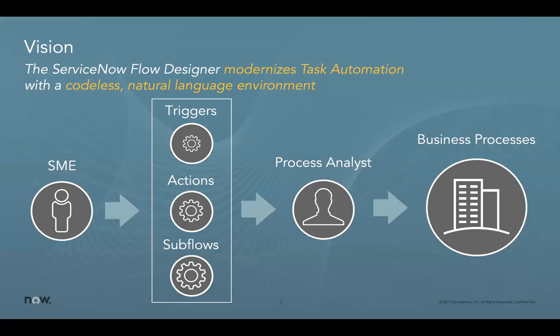So Flow Designer has taken that to the next level, and we've really exposed almost all of ServiceNow's functionality within that Flow Designer for you to be able to automate it. So the sky is really the limit. And it really consists of three different things. It consists of triggers, which is a trigger of some sort that you can define. So that might be when a project is inserted, or when a project of this type is inserted, or something to that effect. And then I'm going to do some action. So some action might be apply a project template, or create a project baseline, or some other activity.